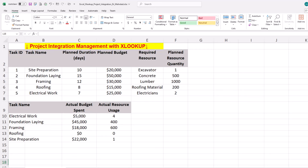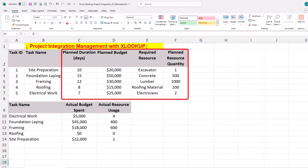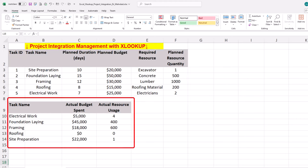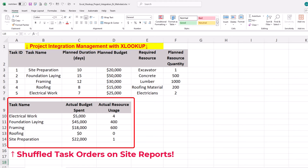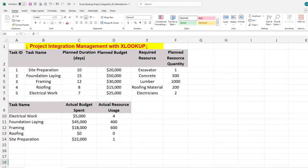Step one is finding project budget variances using XLOOKUP. Our case study focuses on a construction project and we have five project tasks, each with duration, budget, and resource requirement. We also track actual budget and resource usage to identify any deviations from project plans.